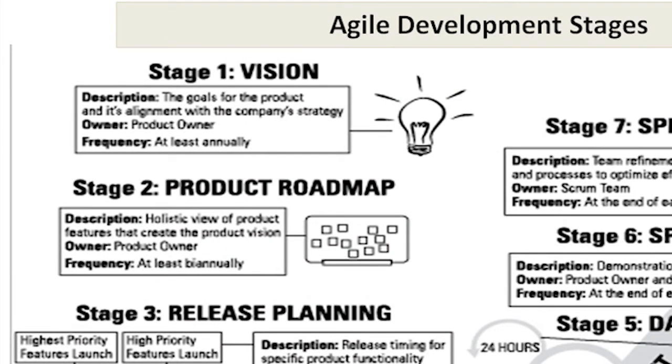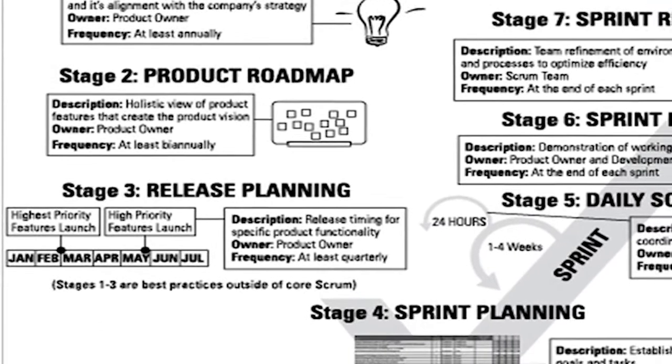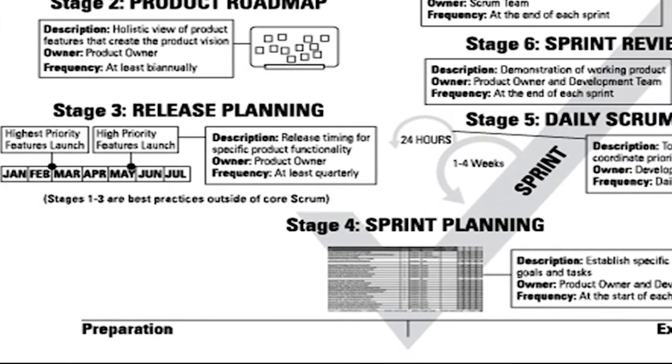The product owner identifies the product vision statement in stage 1 and creates a product roadmap and a product backlog, identifying and prioritizing requirements in stage 2. However, Agile development next focuses on repetitious work cycles. In stage 3, a release plan is created identifying a set of product features and a launch date. Then in stage 4, sprints, short cycles generating potentially shippable products, are created.